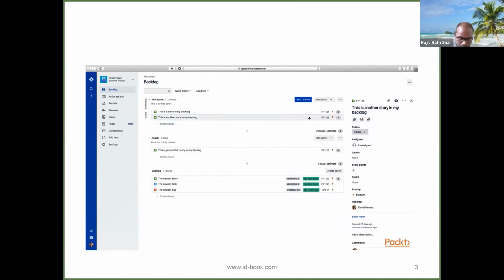All right, so you use the velocity from your previous sprint to help you determine the next sprint. Were we able to complete it? Yes or no? And then adjust accordingly. Now, after 3 sprints, you'll have what's called yesterday's weather. The reason they call it that is because yesterday's weather is known, right? We know what the weather was yesterday, but the weather tomorrow is a forecast. That's the best we can do. It's usually pretty close, but it may not be exactly right. So we can use yesterday's weather, which is the average of the velocity for the last 3 sprints, and that becomes the maximum that we'll want to plan to.